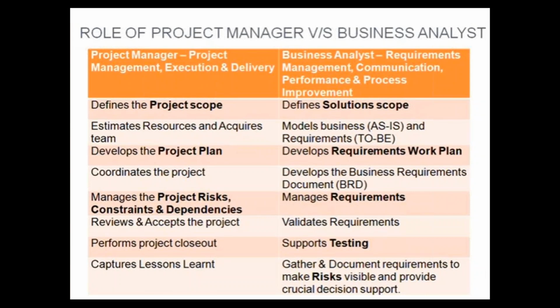Project manager coordinates the project activities. Project initiation, getting resources, assets, etc., and the project starts. Each and every schedule of the project should be met. Any slippage in the schedule must be immediately addressed by the project manager, and the measures on how to overcome that should be taken by the project manager, because you cannot delay any slippages or any missed out schedules, because that will get carried forward and all other remaining modules will get affected.